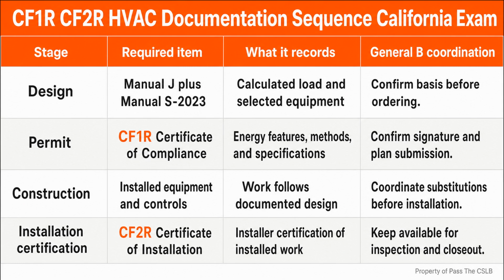Third, suppose a client asks a General B for a standalone heat pump replacement. I would resolve the license boundary before accepting the contract. Does the General B hold the C20 classification? If not, will the entire specialty scope be subcontracted to an appropriately licensed C20 contractor as described in the research? If neither path applies, the General B classification alone is not the answer.